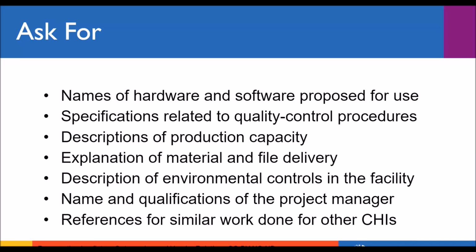So you're going to want the names of the hardware and the software that they're going to use in the conversion, because you want to make sure that they're using the right equipment, and equipment that is capable of meeting your targets. You also want to have them talk about their specifications related to quality control procedures. Like, how do they verify that what they are doing is correct and complete? You'll also want to make sure that they can describe their production capacity so that you can ensure, especially if it's a large project, that they can actually meet the quality and timelines laid out in your RFP.